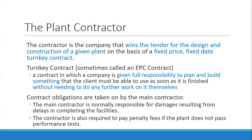The main contractor is normally responsible for damages resulting from delays in completing the facilities. If there is a delay, the SPV can also require penalty fees from the contractor.